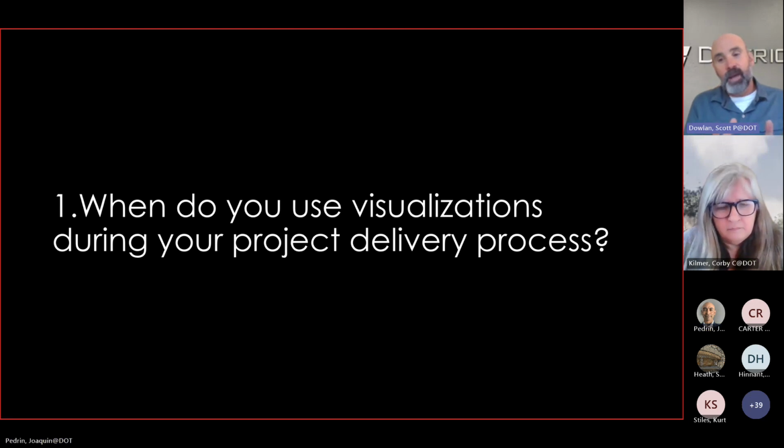So when we start resourcing for what we're going to develop as far as visual communication, it's not the landscape architecture department or the visual department determining it in a vacuum. It's already been determined by all the functional units. And so we say, based on what we're going to produce, this is how long it's going to take us to produce.